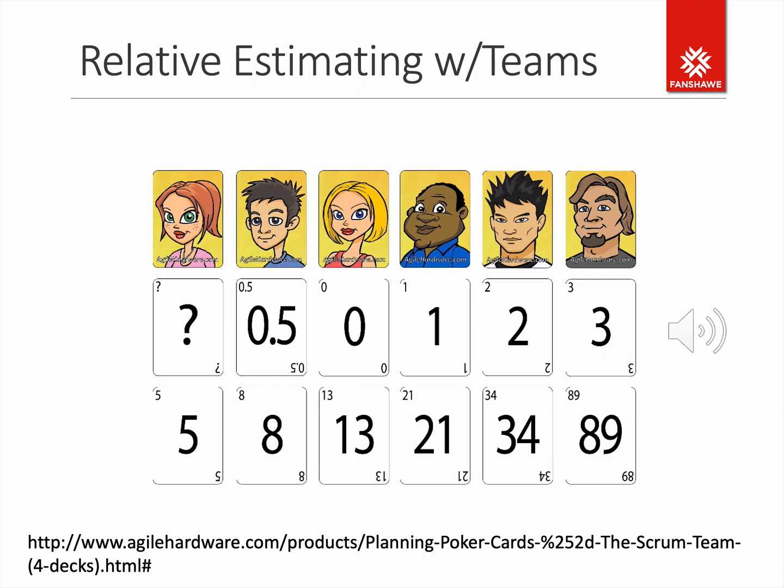You might find sometimes that 3 people say it's a 1, and 3 people say it's a 2. Well, guess what? You want to go to the next highest in the Fibonacci scale, and that's what the Fibonacci is all about. So even though you've got a split decision, half say 1, half say 2, you don't cut it in half and make it a 1.5, but you go ahead and upsize it to 2. You repeat this process until you've estimated all of the product backlog items.